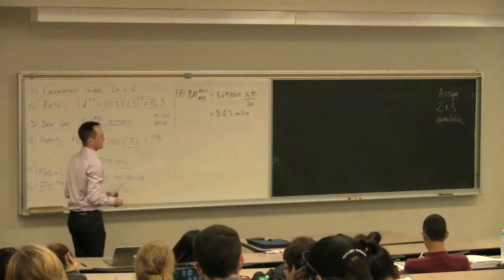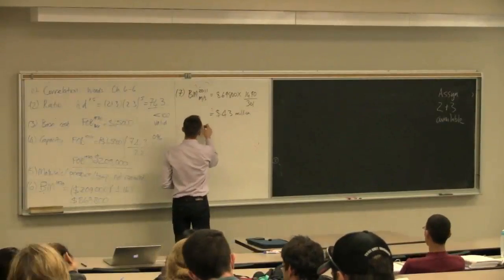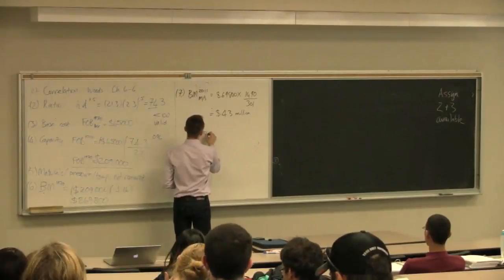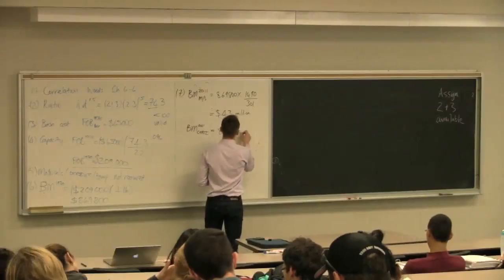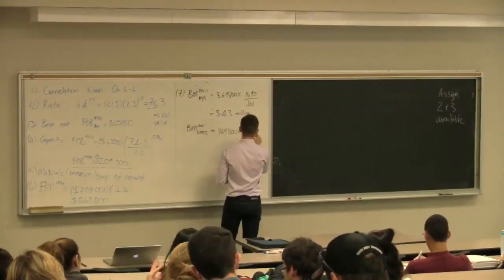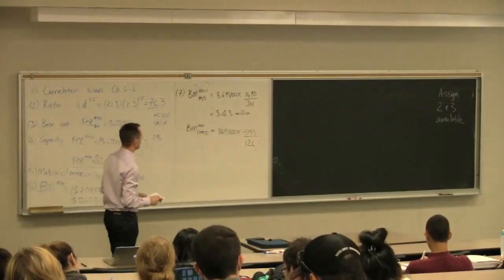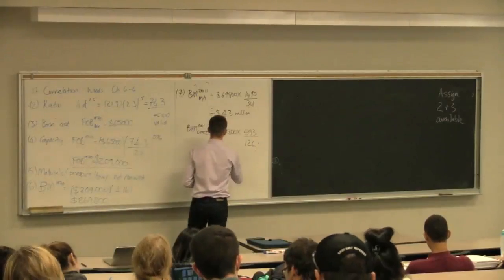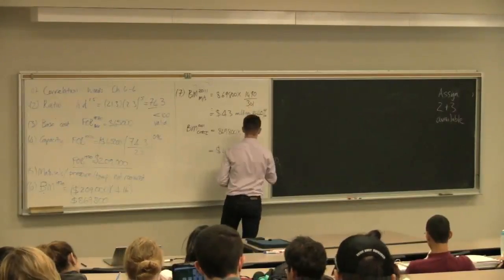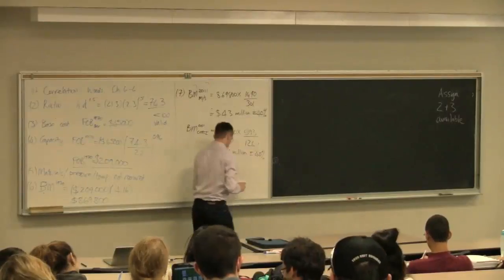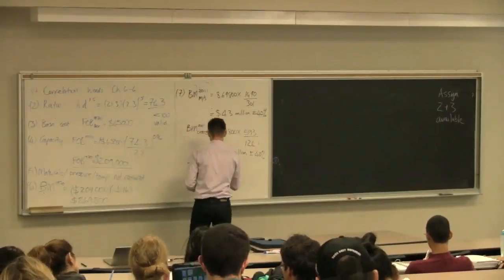Which, just you know, in terms of order of magnitude, seems realistic to me with distillation column today's money. Bare module factor in 2011, based on the chemical engineering process index, is the same value, 869,800, multiplied by 593 divided by 126. So I'm using two indexes this time just to compare, and that gets me a number that's very similar, 4.1. Both of these are plus or minus 40%. So in this case, you would get a number as low as 2.5 to $6 million.